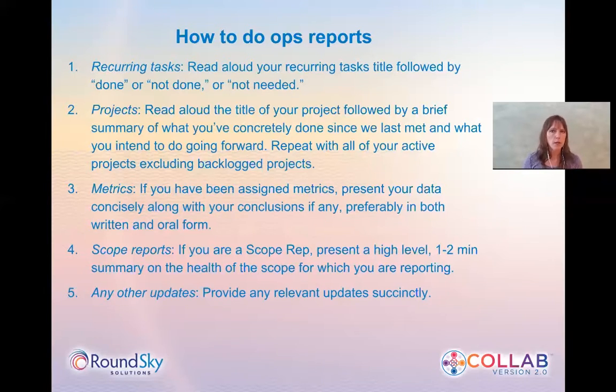These also should be done concisely. During the ops reports, the scribe will mostly be participating as a scope member, meaning they'll be listening to the reports of others and giving their own report as well. However, if any next action or agenda item comes out of these conversations, the scribe will record it on the living agenda. When ops reports are complete, we should have a clear understanding of where our teammates are at and what they plan to do until next meeting.